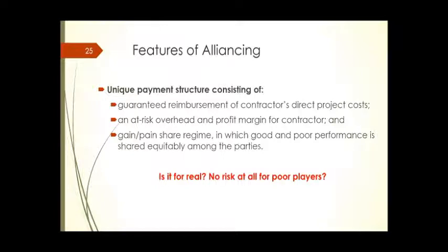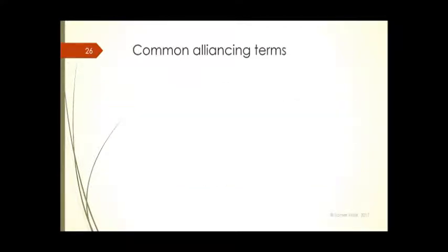But apparently the client is a major risk. If the project finishes, if the budget was 200 and you finish with 400, like what happened in Federation Square, what is the client's remedy? It's only the overheads, which could be only 20. And he will be required to pay or to compensate the others, the 180 millions. So is it really a good thing to do? Yeah? You need to think about that.